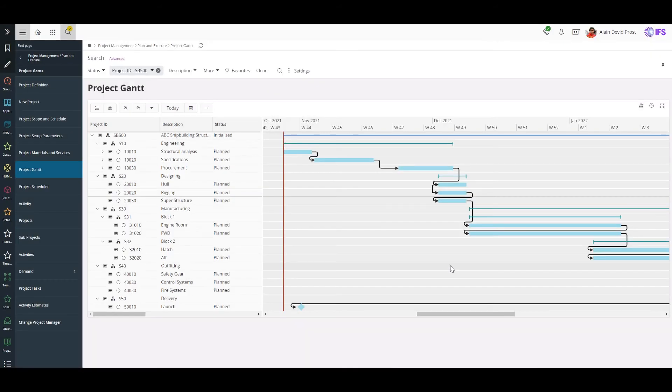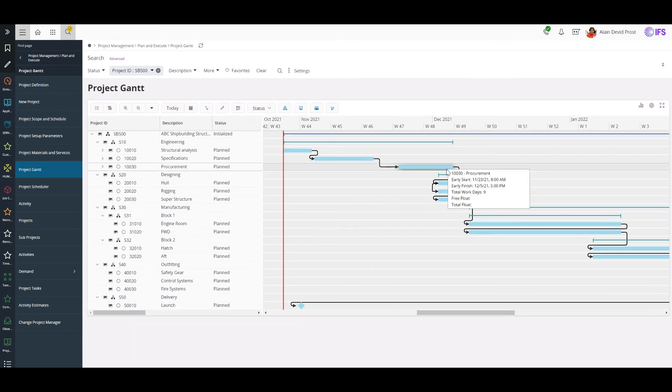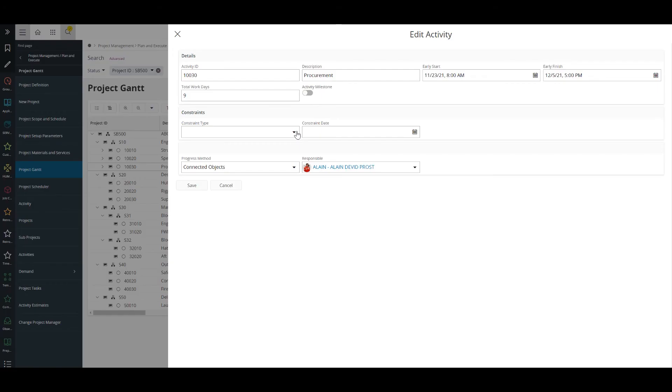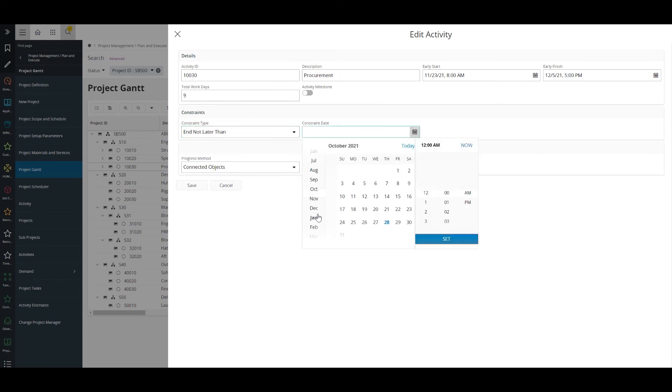And also in order to execute the project smoothly without any exceptions, we have to complete the procurement phase on or before 31st December. So I'll add a not later than constraint to the activity procurement.